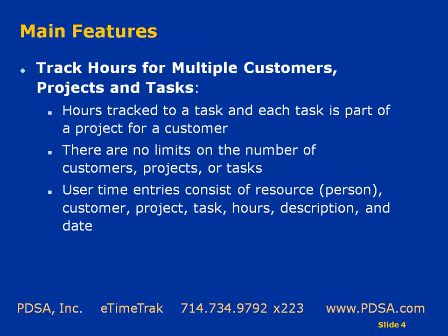Some of its main features are to be able to capture multiple customers, projects, and tasks. So hours themselves are tracked to a particular task, and each task is part of a project. Each project can have multiple tasks, and you can have many projects for a customer. And there are no limits on the number of customers and projects and tasks that you wish to have. A particular timesheet entry consists of the resource or the person that actually expended the time, the customer it's under, the project it's under, the task, the hours consumed, a description, and the date and timestamp of that activity.